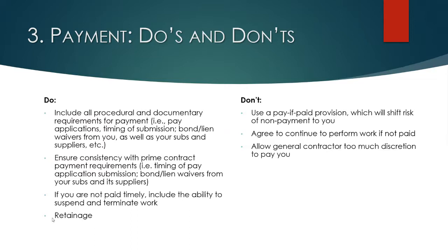Also, as I mentioned earlier, make sure you have, if you can, the ability to suspend or terminate your work if you're not paid. That seems basic, but many contracts that we look at don't account for that. And you definitely want to have the ability, after a certain period of time, if you're not paid, to take those actions. Also, make sure that your subcontract addresses retainage.